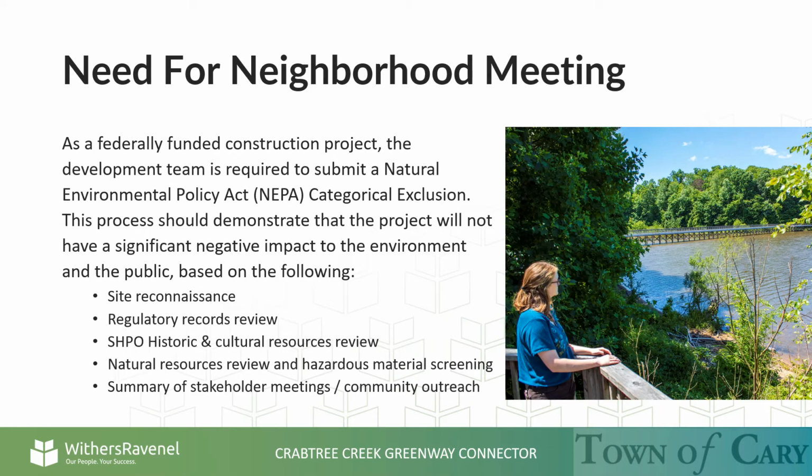Because this is a federally funded construction project, the development team is required to submit a National Environmental Policy Act categorical exclusion. This process should demonstrate that the project will not have a significant negative impact to the environment and the public, based on site reconnaissance, regulatory records review, a State Historic Preservation Office Historic and Cultural Resources Review, Natural Resources Review and Hazardous Materials Screening, and a summary of stakeholder meetings and community outreach.